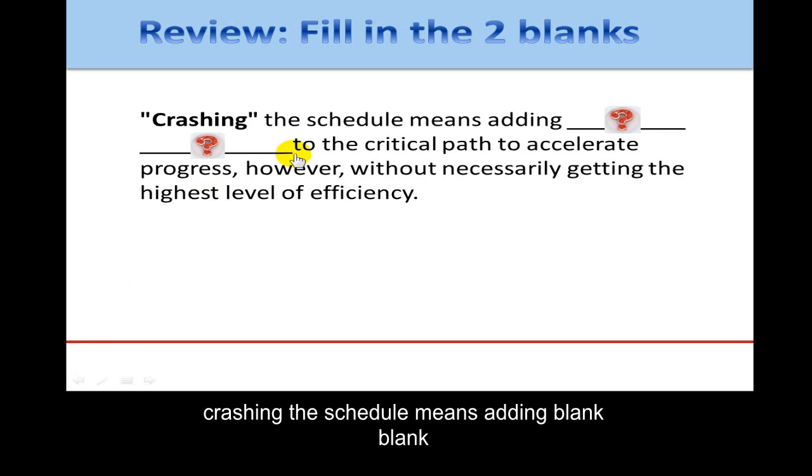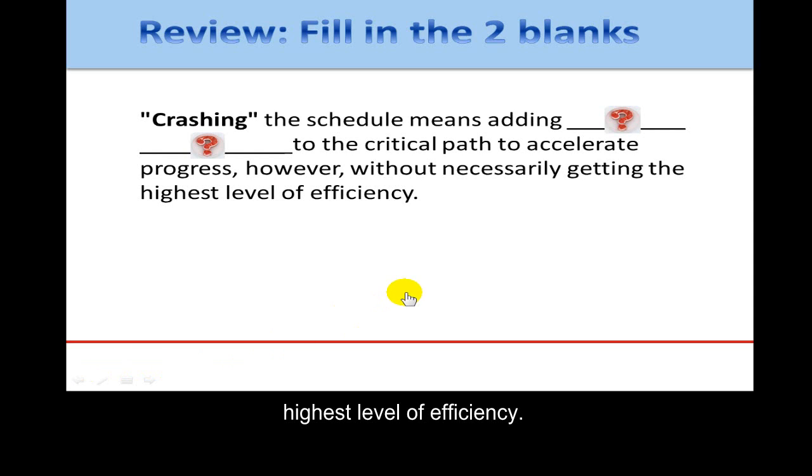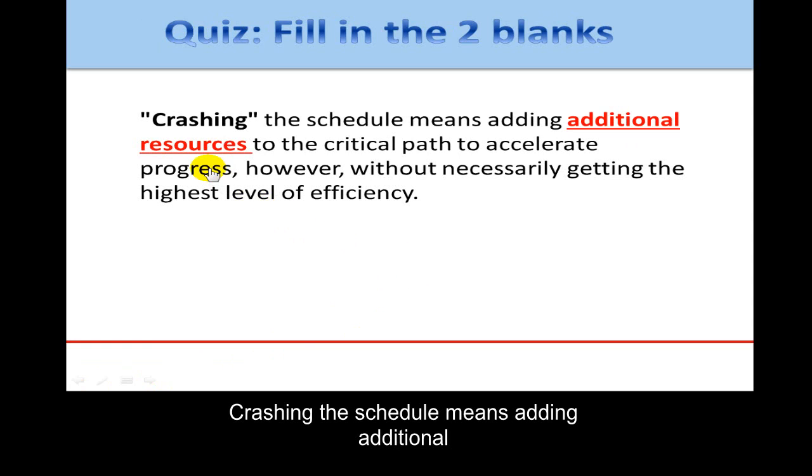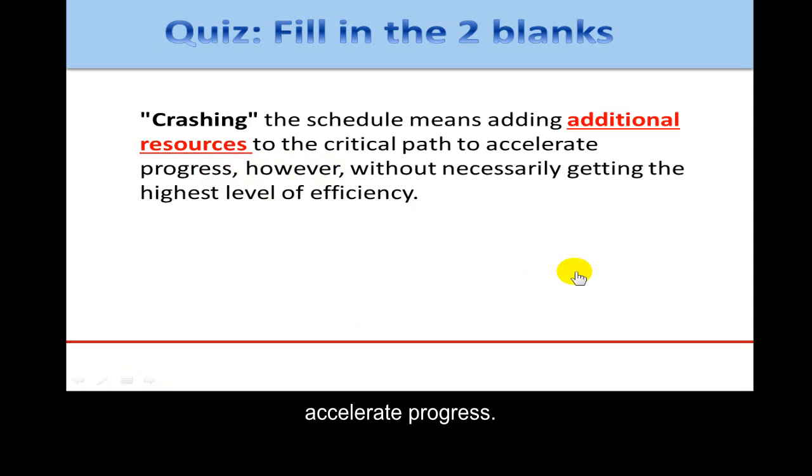Crashing the schedule means adding blank blank to the critical path to accelerate progress, however, without necessarily getting the highest level of efficiency. Crashing the schedule means adding additional resources to the critical path to accelerate progress.